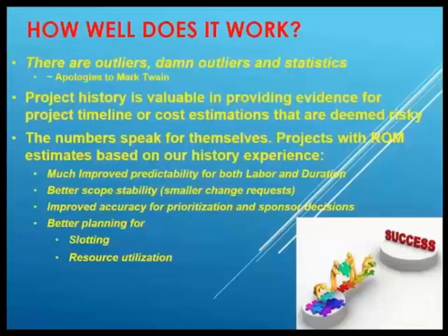Well, you leave them in there. My recommendation is you leave it in there. You don't have to apply it, though. When you create a template or create any SLIM estimate, you don't have to use that data. You can throw it out. But it's important to have it there, because it may be part of a trend and may be part of the way things are going. So you don't want to lose it.